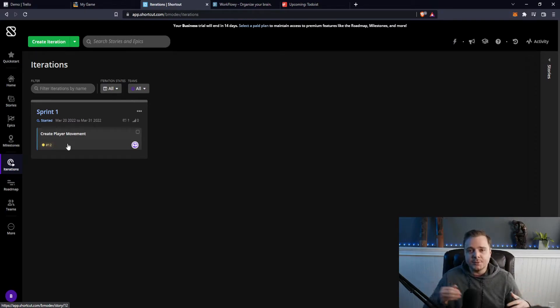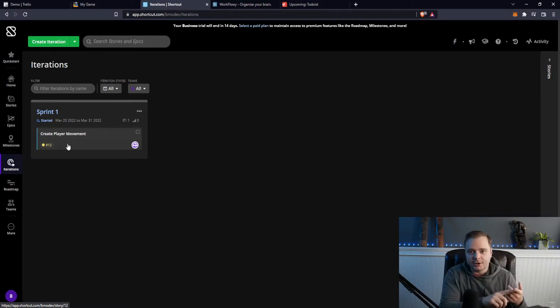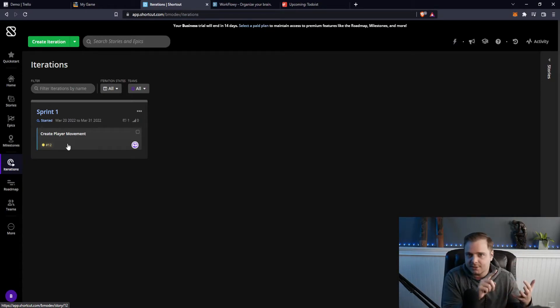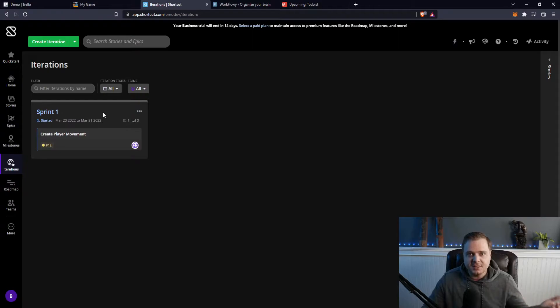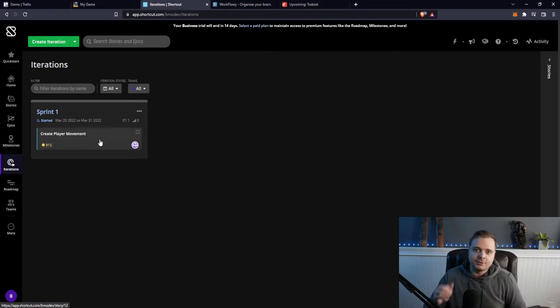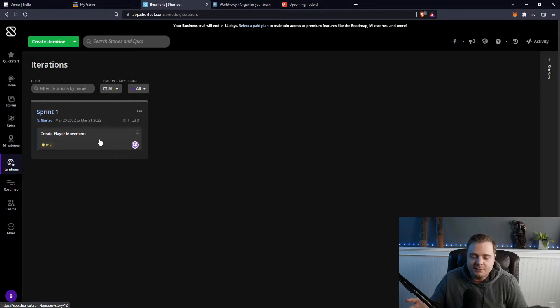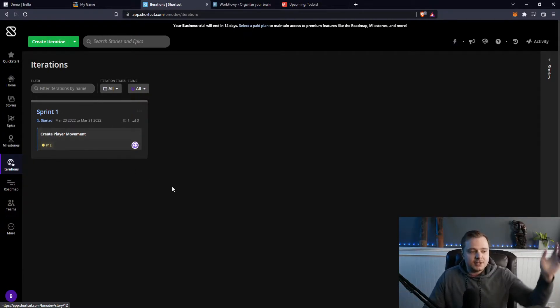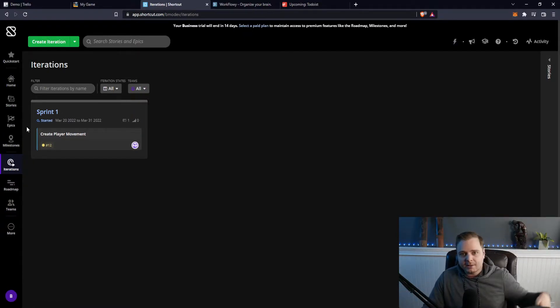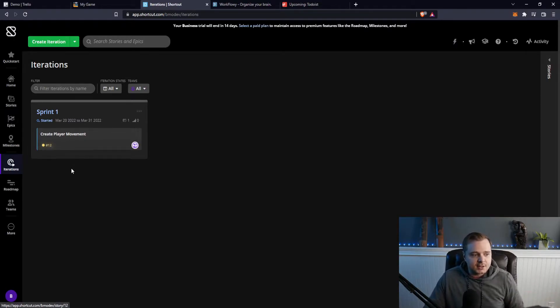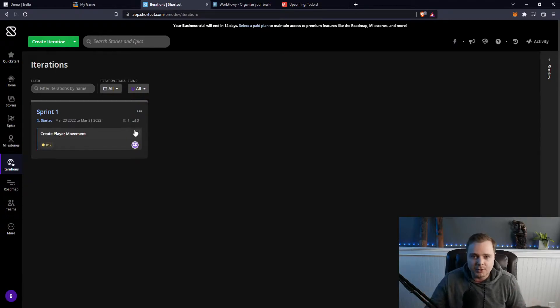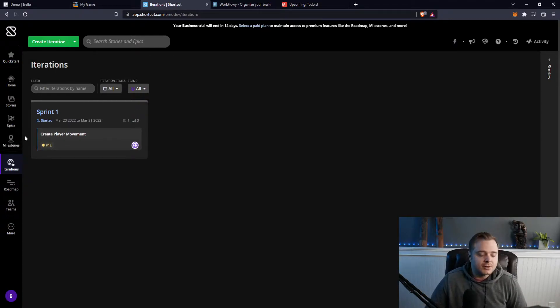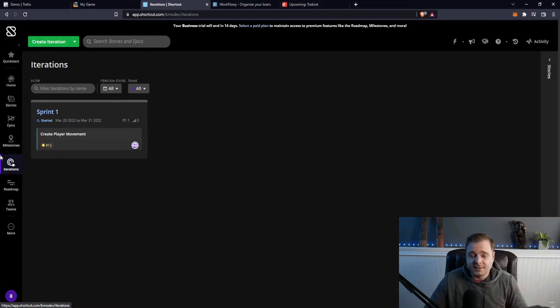So you might have, let's say 10 art tickets in this sprint, like create the user art, create these level one art assets, create this, create that. You have your engineering team, and so they're actually going to create and implement player movement, create the building blocks of the first level, whatever tools you might need. But you can have all this in a sprint. You can make a whole backlog of user stories. And then when this iteration is done, you can basically come in, fill out your whole next sprint, assign it off to people, etc. And so there's a lot more utility in Shortcut. Some of them are restricted by pricing tier plans, but they're not too bad.